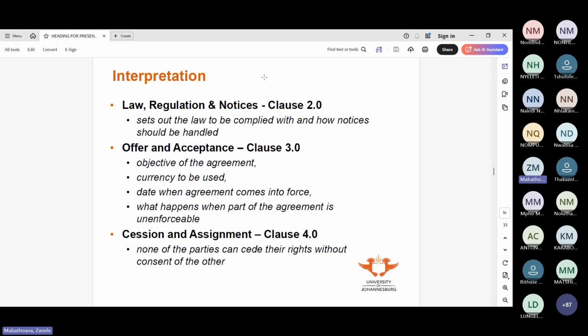However, Mpo owes me money. So then I decide, well, you can build the house, but you will collect your money from Mpo. That's my obligation to pay you, and I'm now assigning it, or ceding it, to somebody else. That can only happen if I give you prior written notice saying, please note that at the end, when you need your money, you will collect it from them, and you agree to it. If you don't, then our original agreement stays.